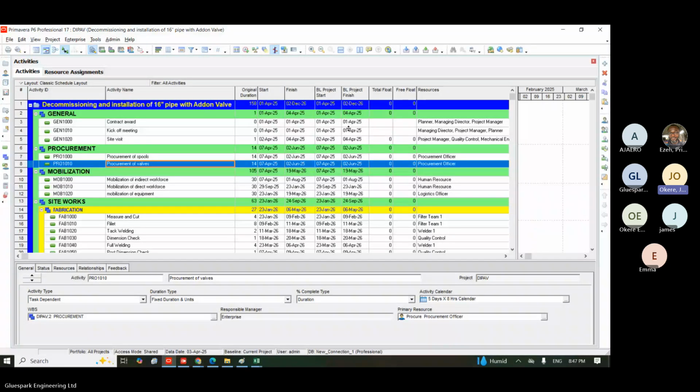But I always advise my students, make sure you use the manual method, because the P6 progress method only works if everything is going as planned. And from my experience, everything doesn't go as planned in a project. Never. Because of that, I prefer updating manually. Secondly, when we update, we change the date, because everything doesn't go as planned. If a project is supposed to start on the 1st of April, but we start on 29th March instead, what will I do?